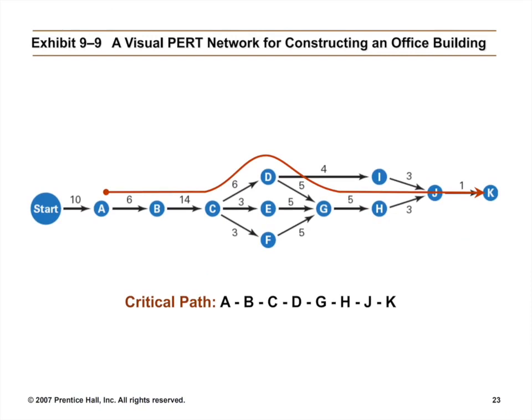And then we diagram in a flow diagram like this, from start, and then activity A, and then activity B, and then activity C, and then in parallel we do activities G, E, F, and then activity T when the T, E, F is completed, and then to activity H, and in another part we do activity I, and then we can do activity J when the activity here and here is completed.